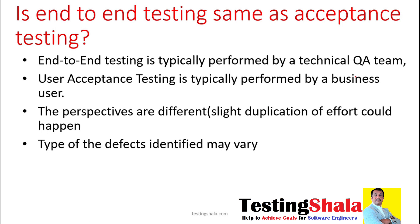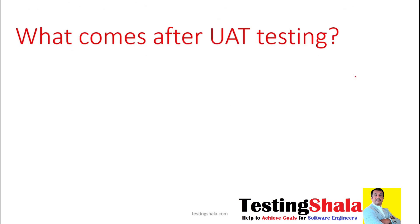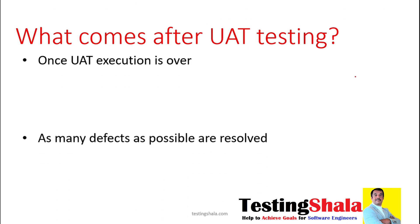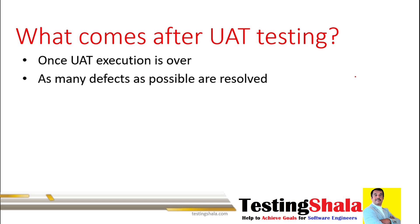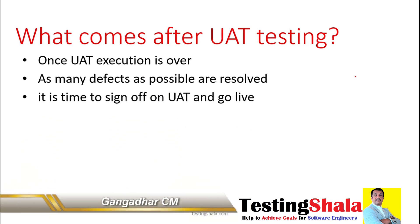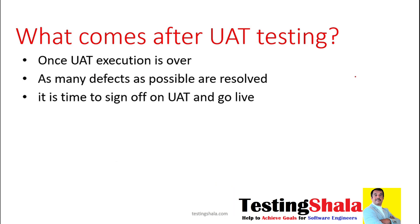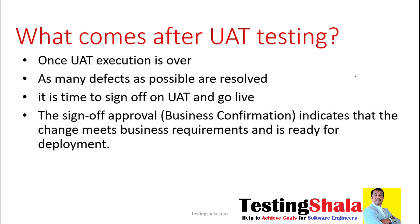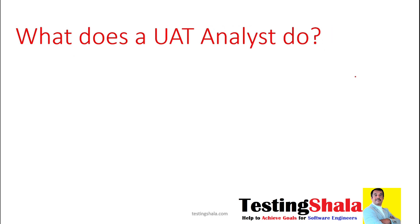The kinds of defects or bugs found will also be different as part of end-to-end versus UAT. What comes after UAT testing? Once UAT execution is over, there could be many defects logged. Developers fix those defects and they get re-verified. Once UAT is successful, the UAT team signs off, and then the overall product or application is ready for deployment.